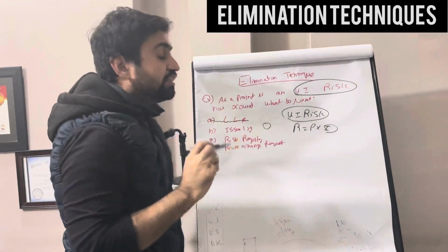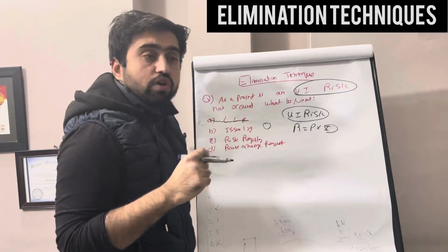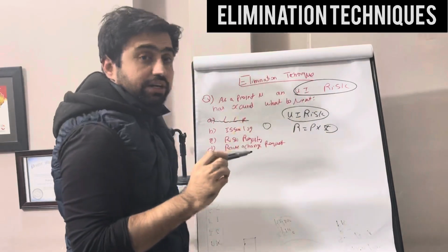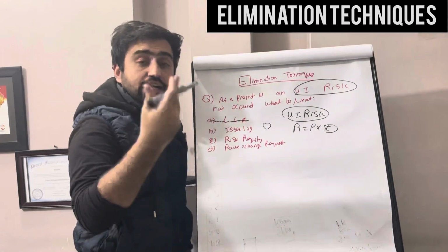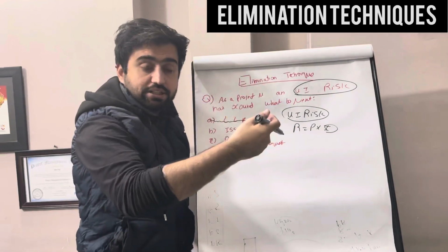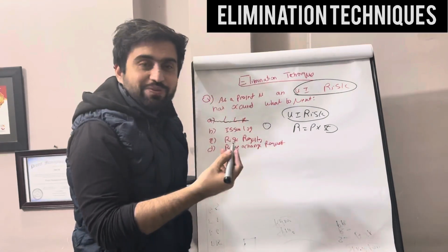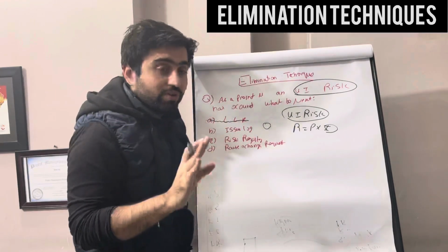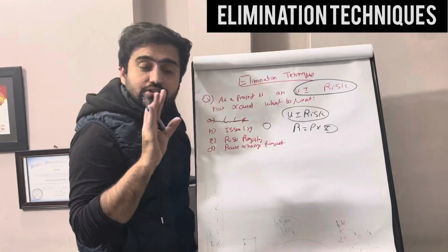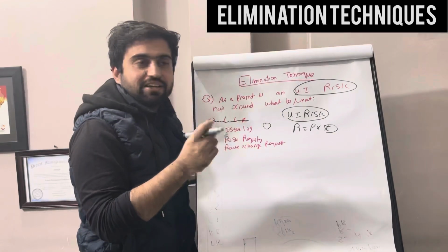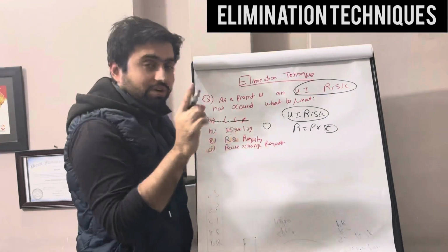Are we going to put it in the risk register? Why are you not going to put it in the risk register? An unidentified risk has occurred. If an identified risk has occurred, you would update its status in the risk register, but this was unidentified. There was no plan. So now it has occurred, it will not go into the risk register. It's a very important point which I just shared: if an unidentified risk occurred, it goes to the issue log, not the risk register.